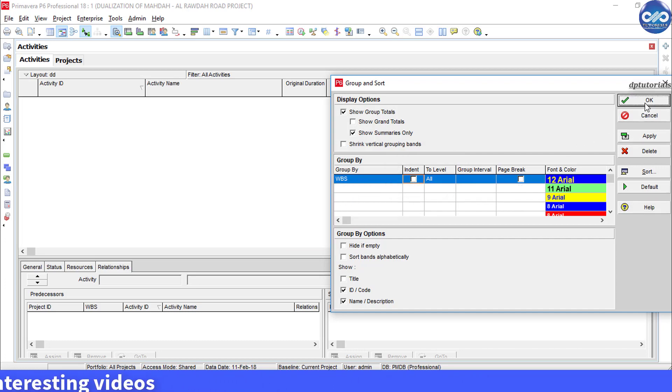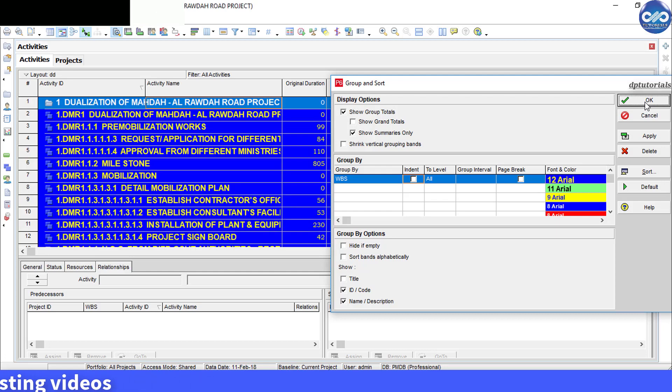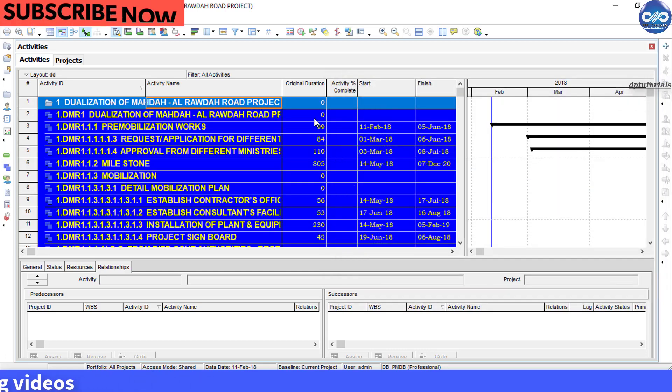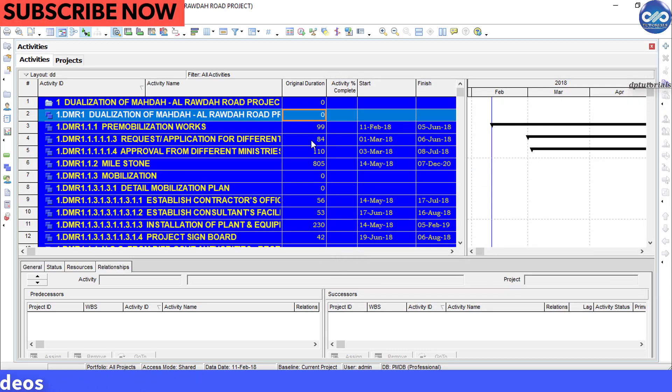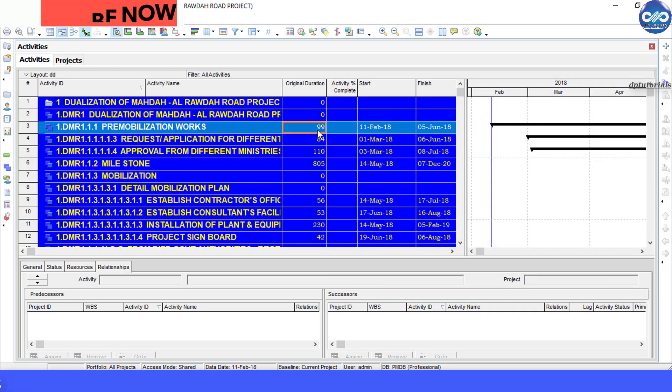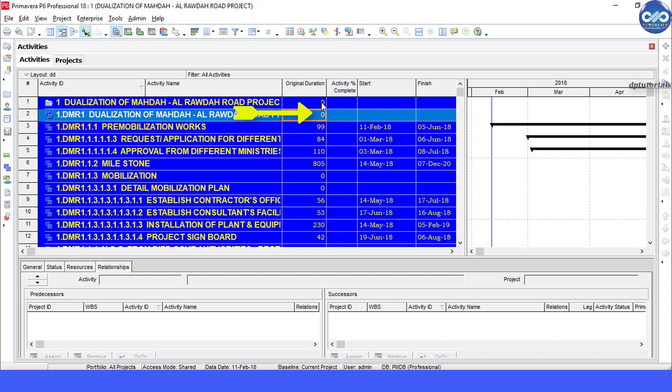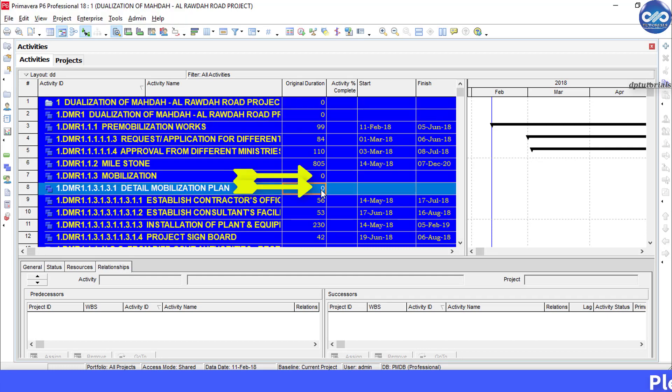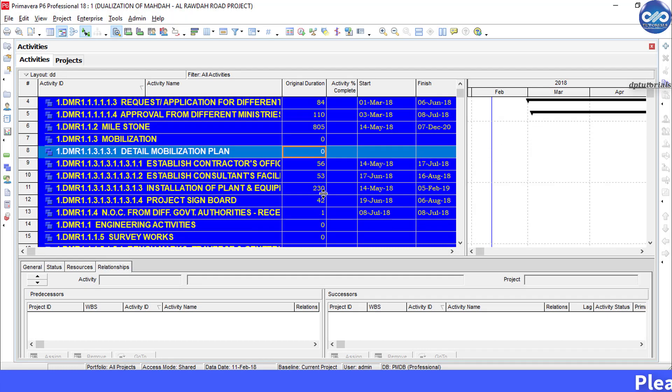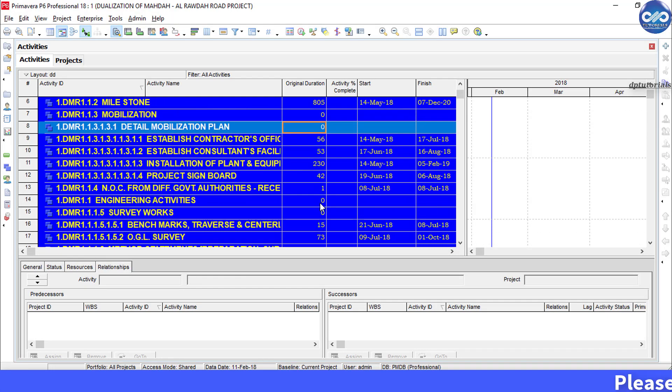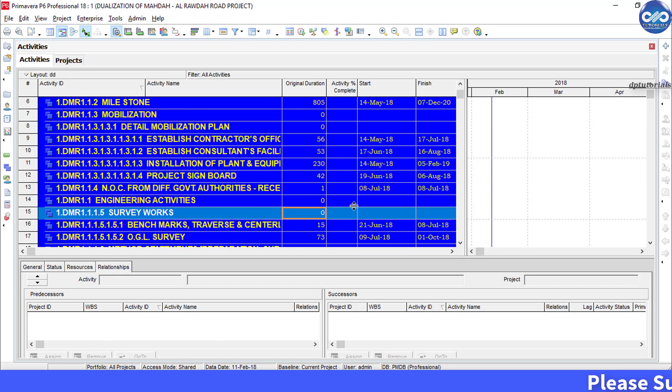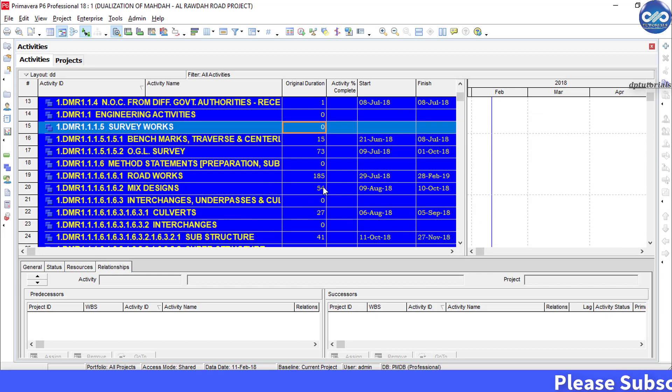Now the summary data appears only at the lowest level. You can observe that the high level WBS items are showing the duration as zero. Got it friends?